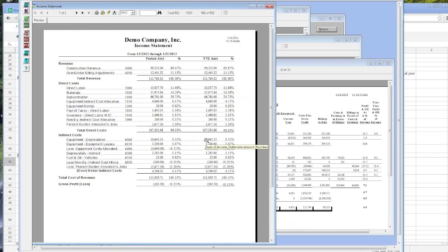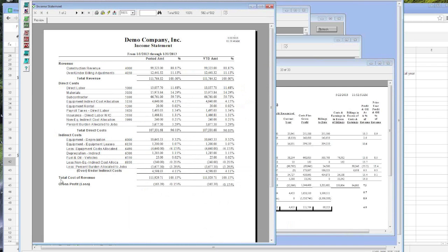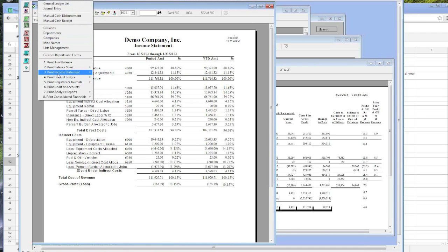And then the question we had is what's the difference between our job cost reports, the 107,332, and the total cost of construction. So our total cost of revenue or projects is 111,000. It's not 107,000 like our job cost reports show. And the difference is our over-under allocation of indirect costs. So you'll set your burdens based on indirect costs, and you'll never be perfect. You can be perfect if you retroactively allocate it, which is what we recommend, periodically, either monthly, quarterly, semi-annually, or annually.